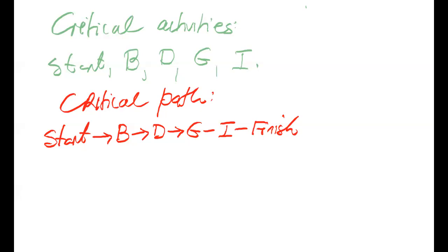All right. Now, as I said to you earlier, how we list the times is dependent on if we're looking at time as deterministic, that is, we're familiar with the activities that make up the project to a fair degree where we can say experience has shown that this activity will take on average this particular time. So we're fairly confident that the activity will take such and such a time. However, there are instances where we're not sure, either the project is fairly new or for whatever reason, you're not confident about the time. Then we resort to a probabilistic statement of the time. That will tell us that we're in the PERT statement of the time for each activity.